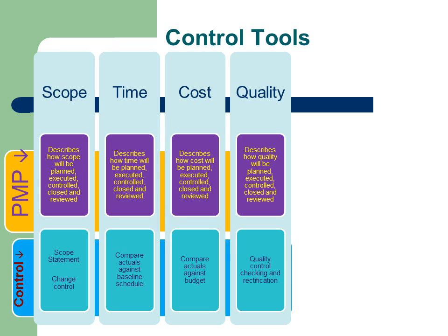It also describes the quality control points and key acceptance criteria. At the quality control points, quality is checked and poor quality needs to be rectified. All quality activities, defects, as well as the actions taken to rectify problems must be documented and reported. Often specialized test coordinators are employed to be responsible for this work.